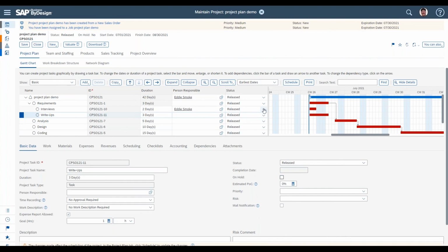Kind of related, but not exactly the same, is you could accomplish the same thing with the task statuses. You could use the stop status. However, in SAP's terminology with their statuses, they also mean stop to mean, stop work and you're not going to do work anymore at all ever again on the task. It's not really driving anything in the system from that perspective, but as you read the help documentation, that's the way it's all phrased. Whereas, if you were really stopping work and never doing it again, some people might think to use the complete, but really SAP in terms of the way they phrase their documentation and the functionality is laid out in the system, complete really means your work is complete and the work is done.